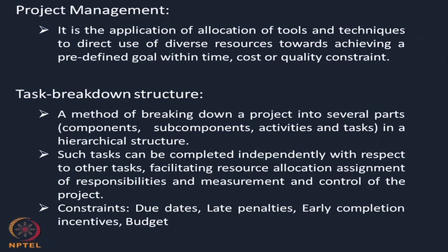The next point is, such tasks, as I was telling, can be completed independently with respect to other tasks, facilitating the resource allocation, assignment of responsibilities and measurement and control of the projects. That is, it may happen that some tasks can be completed independently without bothering about whether other tasks have been completed or not. And sometimes you will find that there are some tasks which cannot be taken up unless some earlier or predecessor tasks have already been completed.